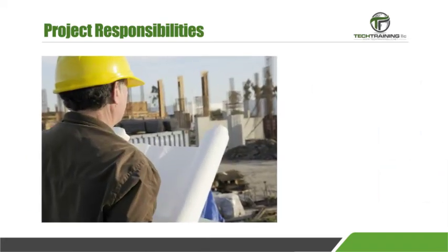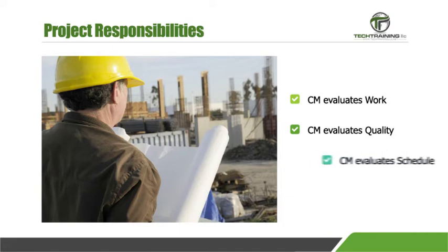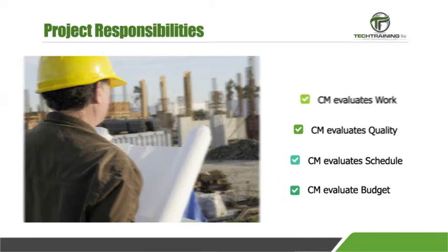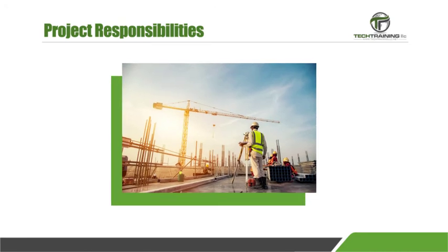As for the construction manager, they should be overseeing each contractor's work, quality, and performance. Since the CM is a key player in any delivery method they are involved with, they will also be responsible for the master schedule and project budget, meaning any variances should be reported and dealt with immediately. And there's the contractor themselves.